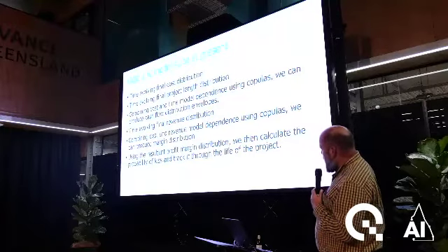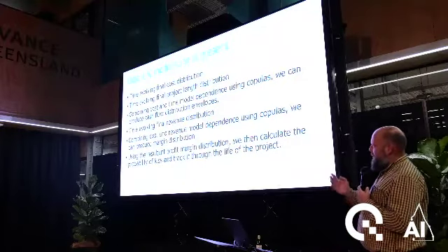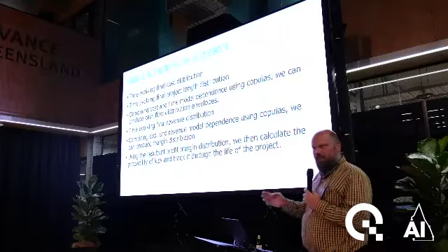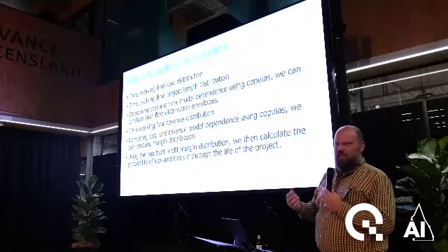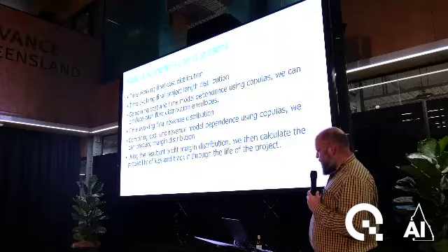Also, once we have the profit margin distribution, we can start selectively calculating the risk of loss on certain projects going through time. So then you're able to categorize them earlier on, and this becomes an alert or a warning system for the project managers.